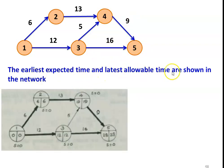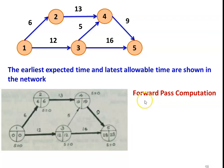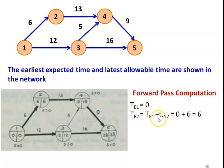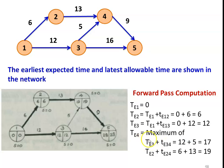The earliest expected time and the latest allowable time are shown in the network. In the event circle, we have the event number with the TE value on the left bottom and TL value on the right bottom. In the forward pass computation, we calculate the earliest expected time. For the first event, TE1 = 0. For the second event, there is only one incoming arrow: TE2 = TE1 + t(1,2) = 0 + 6 = 6. For the third event, TE3 = TE1 + t(1,3) = 0 + 12 = 12. For event 4, with two incoming activities, TE4 = maximum of (TE3 + t(3,4)) = 12 + 5 = 17, and (TE2 + t(2,4)) = 6 + 13 = 19. The maximum value is 19.